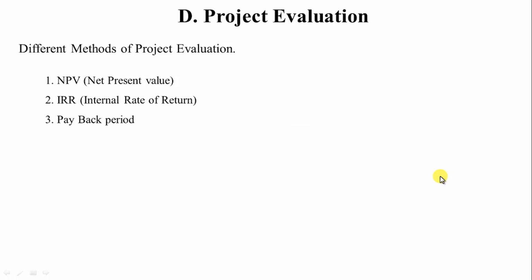Next is the payback period method. In this method, we're trying to define how quickly the project can recover the entire cost invested in it. Next is discounted cash flow analysis. This method is said to be an extension of the payback period method, but over here you discount the cash flow based on the future value of the cash flow and then determine the earliest point of time when you can have the actual recovery in terms of the present value of cash.